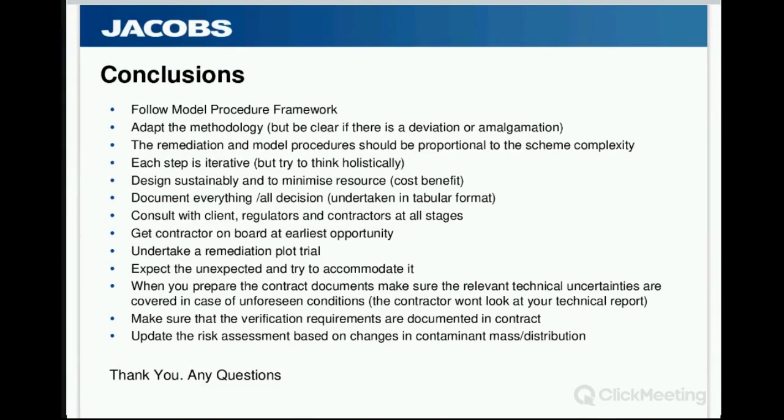Also, make sure your verification requirements are in contract. Again, quite often they're omitted, and you'll be in for a nasty compensation event if you suddenly start adding things into contract. And also, at the end of the process, as part of your verification, there should be a factual verification element. And I do see quite a lot of factual verification reports, which are lovely, but they're not tied back to the original conceptual site model and the risk assessments. So you need to update your risk assessments and your contaminant changes in your mass soil distribution. And so you need to close out that CSM.